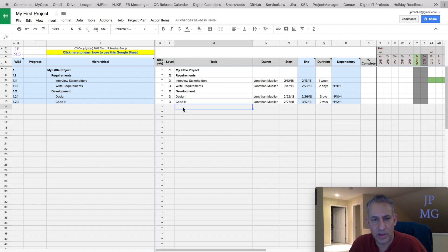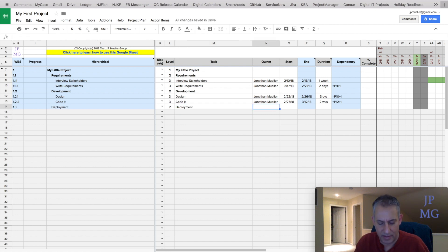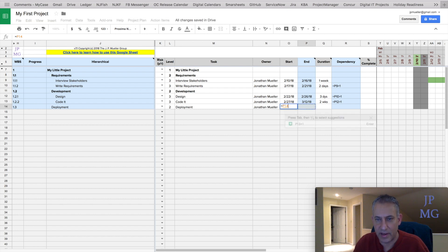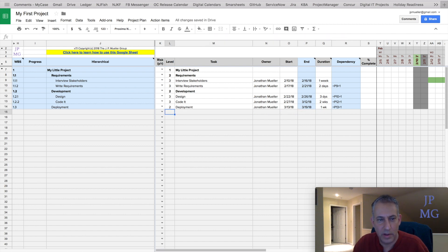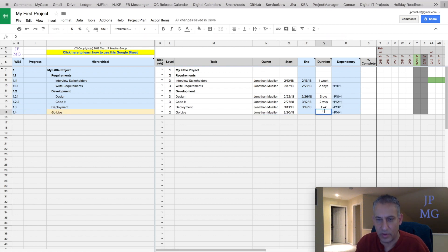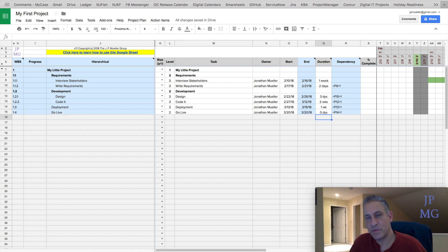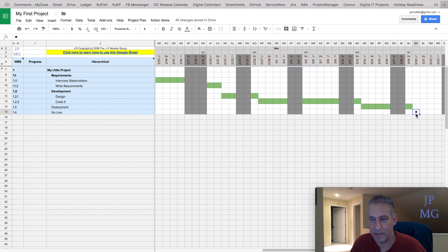Let's add a few more tasks. We'll go to level two and add "deployment" as a regular task, make it start after the previous one is done, and give it one week. Then let's add "go live" — after deployment — and we'll call it zero days. A task with zero days we consider a milestone. Milestones appear as a diamond in the Gantt chart, and you can configure the shape.